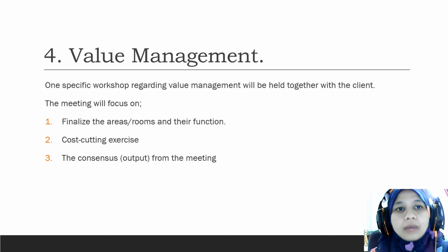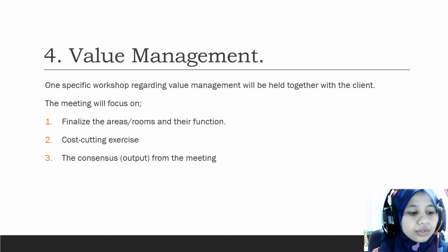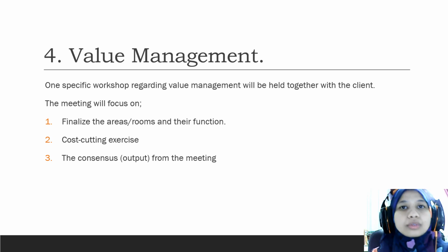In this workshop we will also get the consensus from the client. So the output from the workshop is the final schedule of rooms or spaces, the estimated project cost and the project schedule.